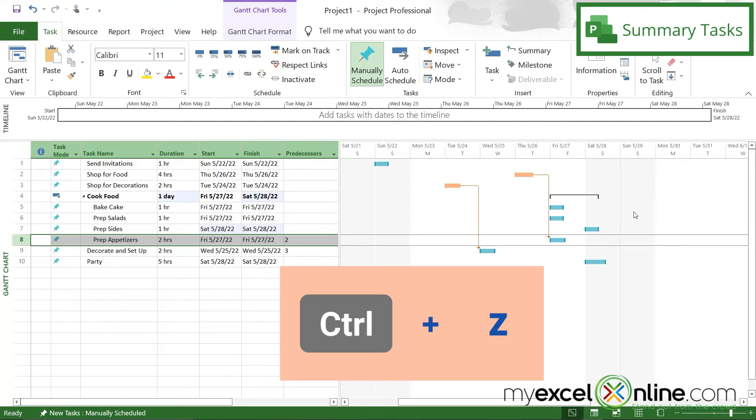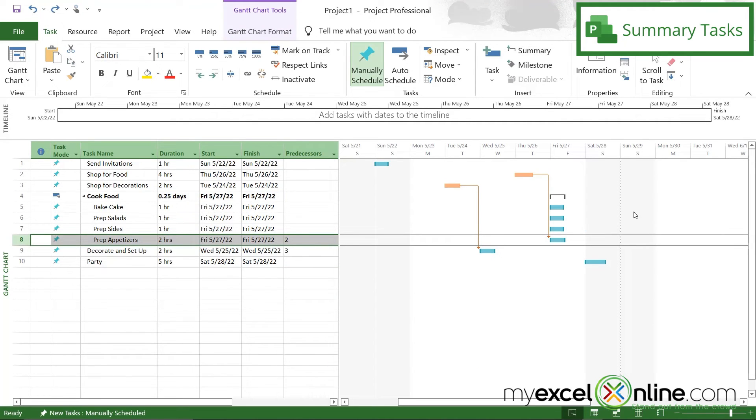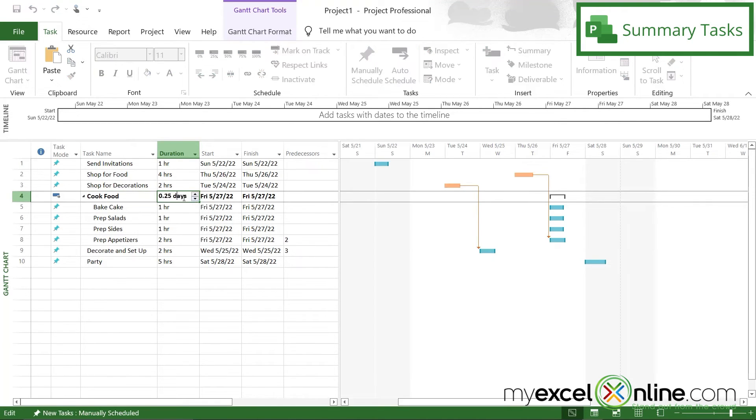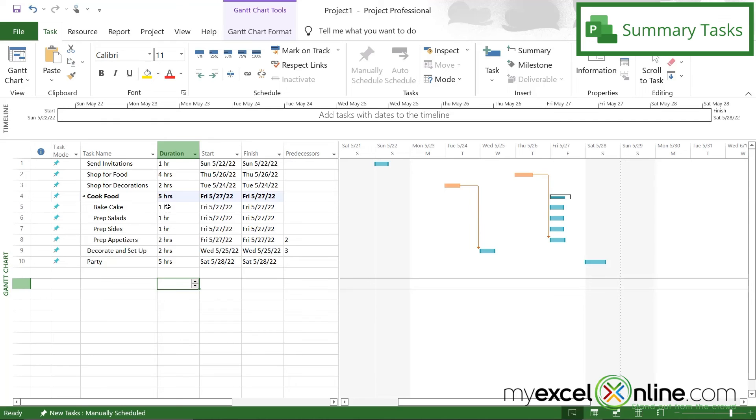But I'm going to hit control Z to go back to the way that we had it before. And I'm also going to go up here and change this duration to five hours because that's what all of my subtasks add up to.